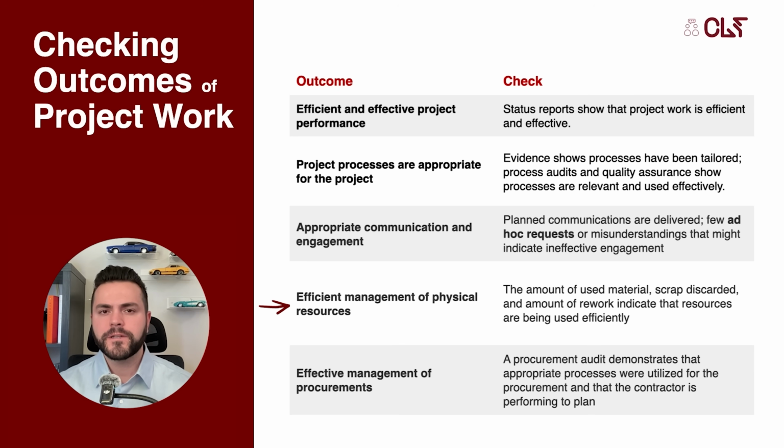We confirm efficient management of physical resources by looking at metrics like the amount of used material, scrap discarded, and the rate of rework. Effective management of procurements is verified through a procurement audit that demonstrates appropriate processes were used for the procurement and that the contractor is performing to plan.